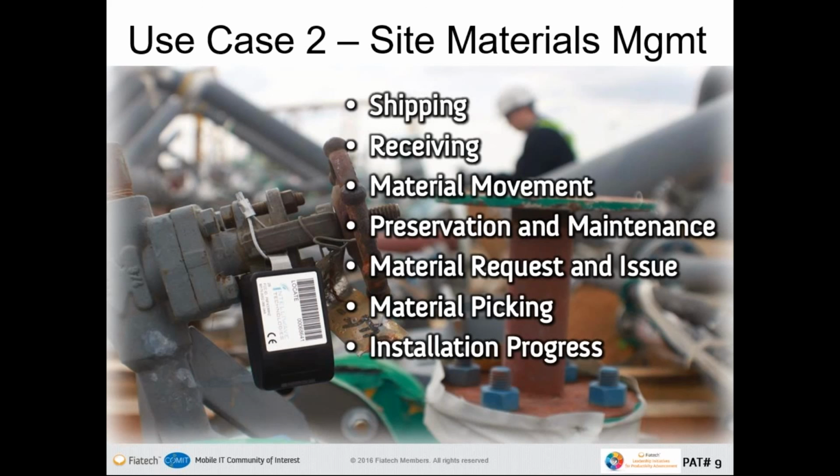The other point here, material movement. If you're transferring materials from one warehouse to the next, you can also do that with a mobile device, so you can scan it, update its warehouse location, and then re-enter that piece. Especially if you're working some of the forklifts outside, and you maybe move one material to get to another piece of material. If you want to leave that first material in place, you can just rescan it and update its material location right there. So instead of it being in grid A1, now maybe it's in A2. And all that, again, is with the mobile device.